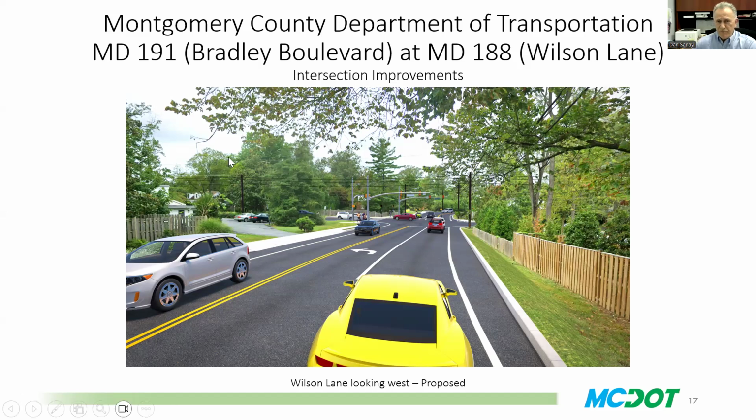And for the drainage structures, we ended up getting some temporary and permanent right-of-way easements. The temporary is just for the construction. The permanent easement is for drainage structures. So basically, in a nutshell, this describes the scope of the project.